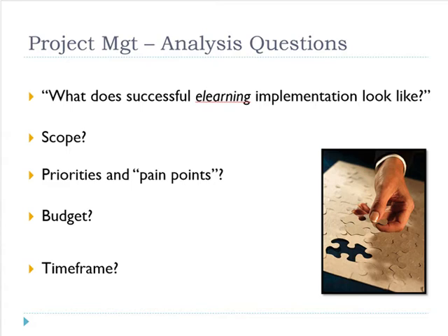So we'd always want to be on guard talking about that, again, gently and diplomatically with the course champion about budget, and say, well, is this a good time for us to expand the scope of the training? It has been a while since that course has been updated. Are there additional features that perhaps you would like to add at this time? Or if we don't have time, we don't have budget, et cetera, then I'm going to need you to help me clearly and concisely define the scope limits here and help us keep everybody within that dimension. Because, again, it's very easy to get outside and experience scope creep.